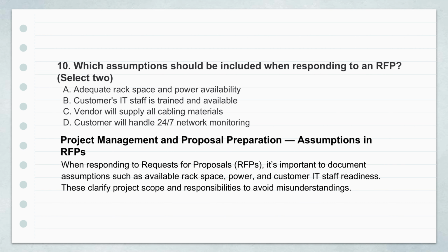And the business angle. When you're putting together a proposal, say for an RFP, or request for proposal. Yes, responding to RFPs, one of the most important yet sometimes overlooked parts is clearly stating your assumptions. Assumptions. Like, what's your guess? Not quite guessing, but defining the conditions your proposal relies on. Things you're taking as given unless told otherwise. For example, assuming there's adequate physical rack space and sufficient power and cooling where the equipment needs to go, that's a common one. Or assuming the customer's IT staff have the necessary training or will be available to help during the implementation. Why is stating those so important?